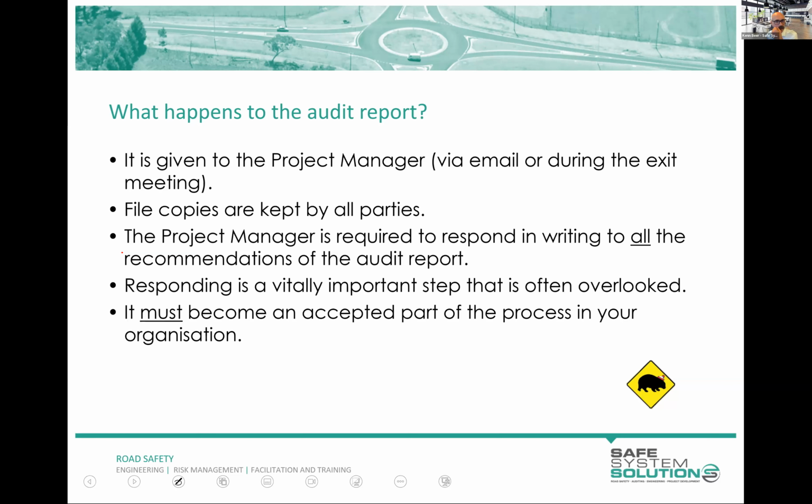The project manager is required to respond in writing to all the recommendations in the audit report. When I say respond, I mean they actually respond themselves. They don't need to hand it back to the audit team. Responding is a vital part. It's so important, and it's often overlooked.